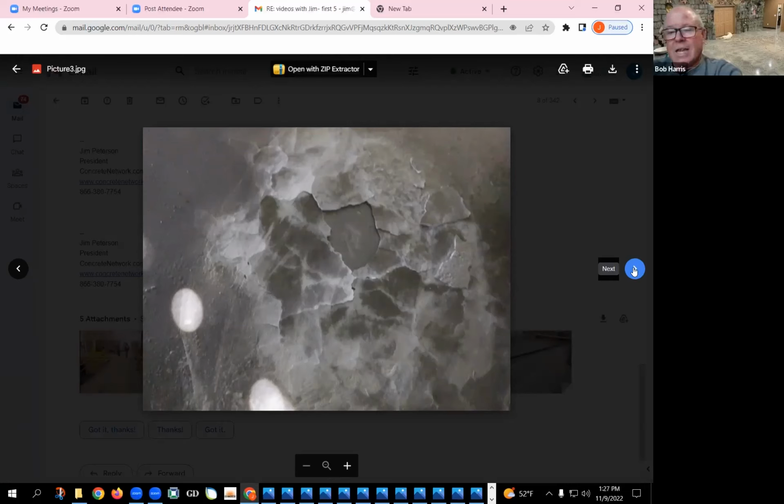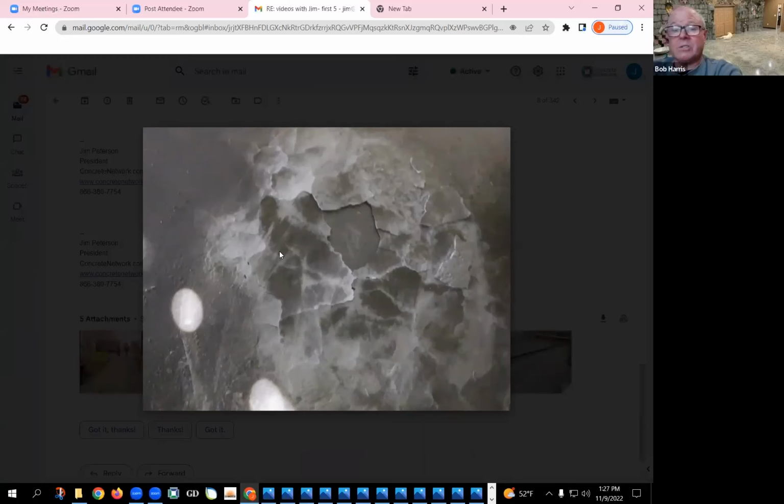In this, I can't emphasize and stress enough the importance of the polishing contractor walking the floor first. Every square foot of that floor, you must walk it with your floor plan and identify all of the problems in the photos that we've looked at so far. And is that walking with the superintendent or an owner's rep? Preferably, yes. Good advice.